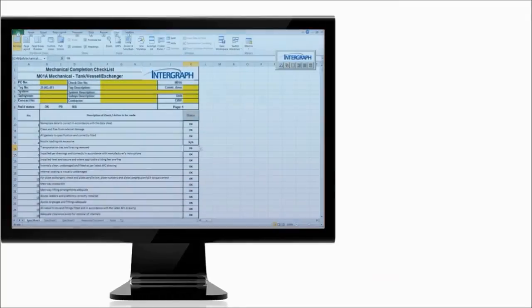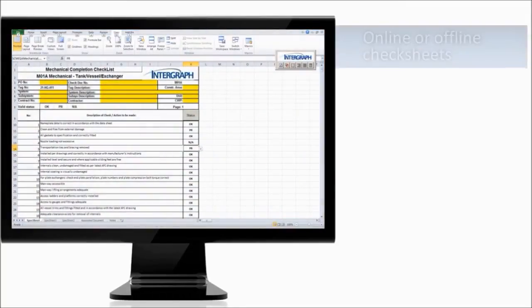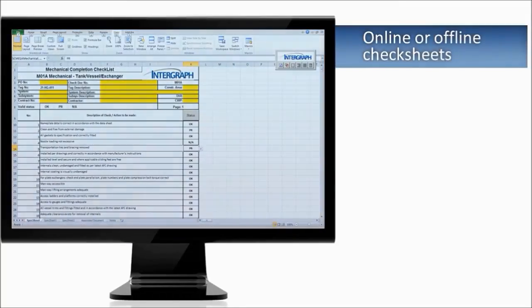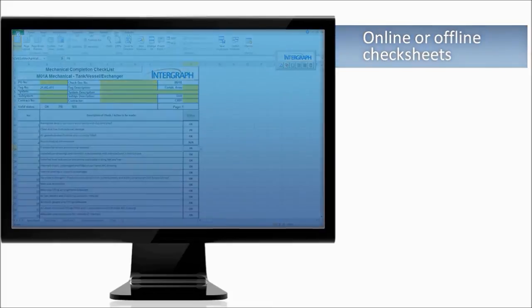Check sheets are an important part of any systems completion solution. SPE Systems completion enables you to complete check sheets electronically in the field, either online or offline on a mobile device.